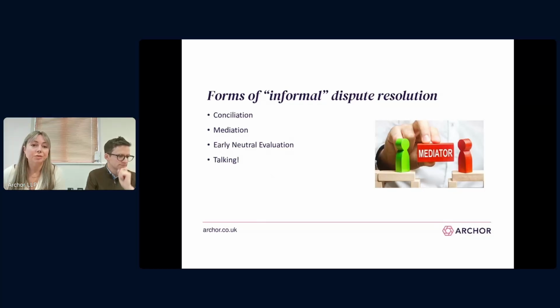So it involves appointing an impartial third party, a conciliator, to assist the parties in resolving the dispute rather than making any sort of decision. But the conciliator will take a proactive role and independently assess the merits of the case, and he will make suggestions about settlement and comment on what he thinks is a fair resolution.